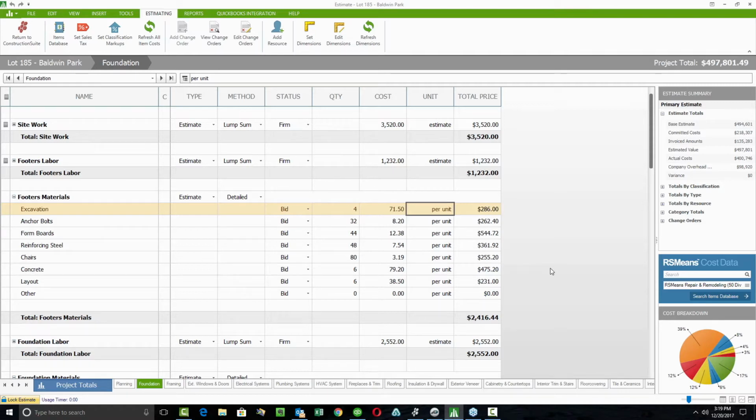And with those cost books, if you've used them before, you know that they are very item rich. Some of these cost books can have upwards of maybe 40,000 line items in them. And so one thing that RS Means has always done, and one of the tools that we've always provided in that partnership, is the ability to create assemblies. And an assembly, not just with RS Means but in any system, is a collection of the parts and pieces required for building one thing.